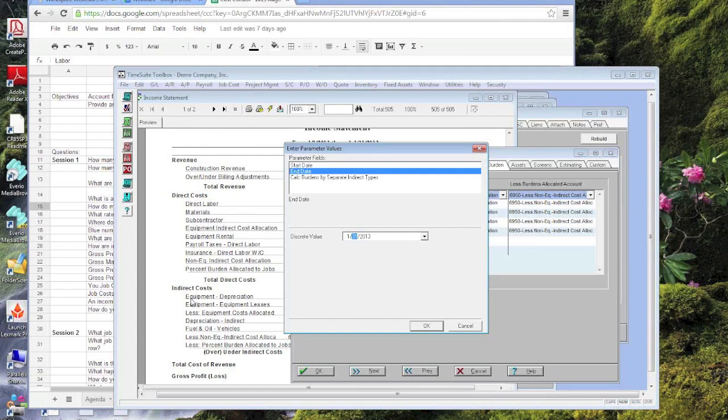But for the most part, if you're not dealing with equipment and plant, you're just going to have costs that are like field vehicle expenses, maybe health insurance for your field employees, maybe shop expenses, shop supplies, and those kinds of expenses that need to be allocated off of the job and into the direct section. Even if you have small equipment, for example, a skid steer, or field vehicles, you'll have depreciation on those vehicles and skid steers, and small tools that hit the indirect costs. The estimators will always account for those in the estimating process. The accounting process has to support the estimating process.